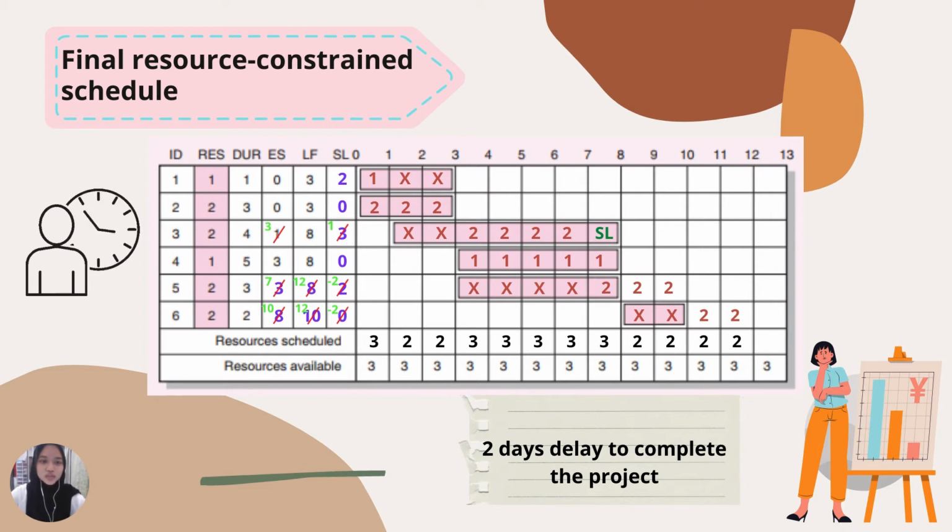So we fill at the first, between 1 to 1 duration. Then the resources available is 3, which has reached the limit. The second activities, where the activities begin at the same time, are activities 3, 4, and 5. To consider this, we must look at the minimum number of slack first. We will choose ID4 because the slack number of ID4 is lower than ID5, which is 0.